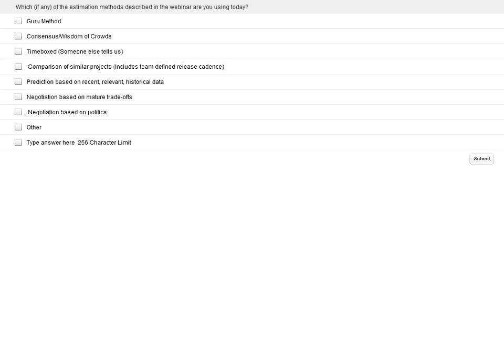One other thing came to me too, and that's if you're spending time debating on the size of a task, whether a task is a 5 or an 8, or if it's small or medium, you should probably focus that energy elsewhere, like maybe on reducing this or breaking that task down further so that every piece of it is small. So I like stability. I like tasks that are so small that have a modest amount of variation. We can just count the tasks and stop worrying about the multiplier. Yeah, absolutely. Let's go check it out.